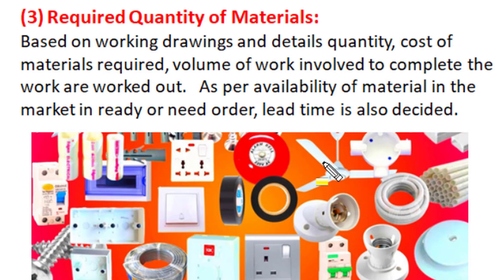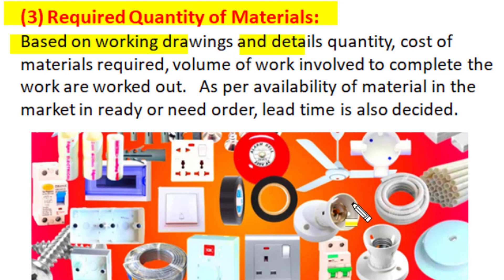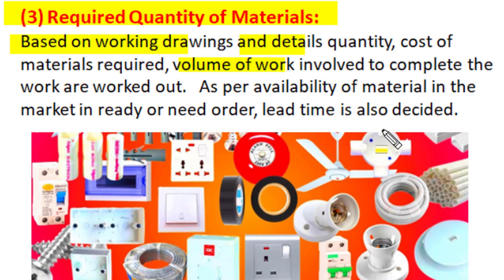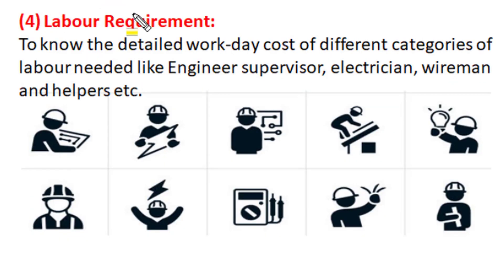After selecting the type of electrical items and workmanship, the required quantity of those materials and workmanship has to be assessed based on working drawings and specification details. The quantity and cost of material involved in project installations are calculated, and the volume of work to be carried out is also worked out. It is also assessed what availability those materials have in the market — if readily available there is no issue, but if an order is needed, the lead time must be considered so that orders can be placed well before actual requirement.